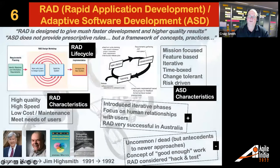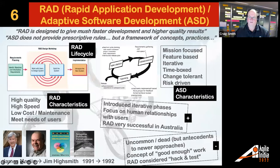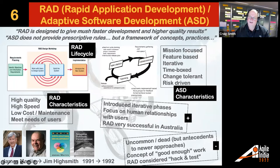RAD — Rapid Application Development — and Adaptive Software Development also go back to the early 1990s. James Martin was looking for things at high quality, high speed, and low cost, but meeting the needs of users, which was radical at the time. Jim Highsmith picked this up in his work on Adaptive Software Development, with the idea of cycles: speculation, collaboration, and learning — some kind of discovery then delivery loop. In the 1990s it was considered 'hack and test,' but a lot of our methods are built on the shoulders of these giants.